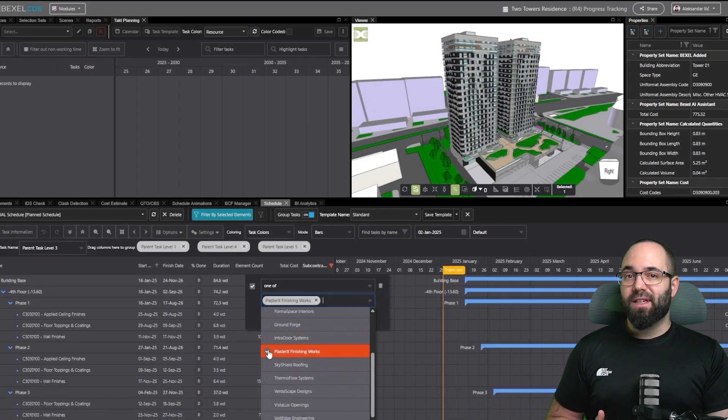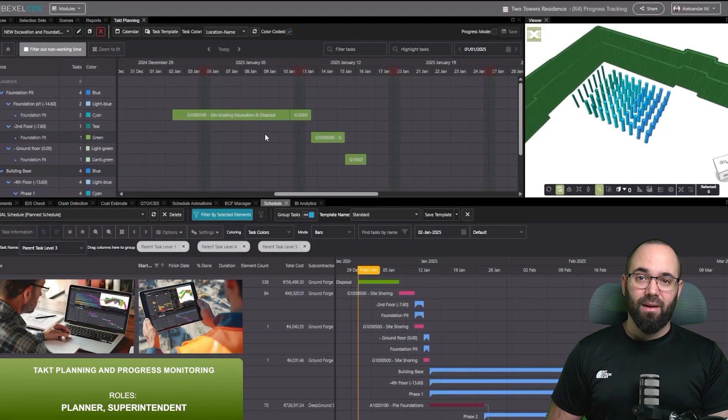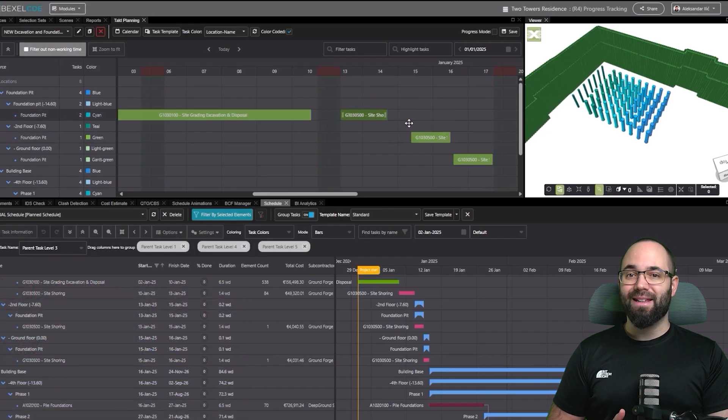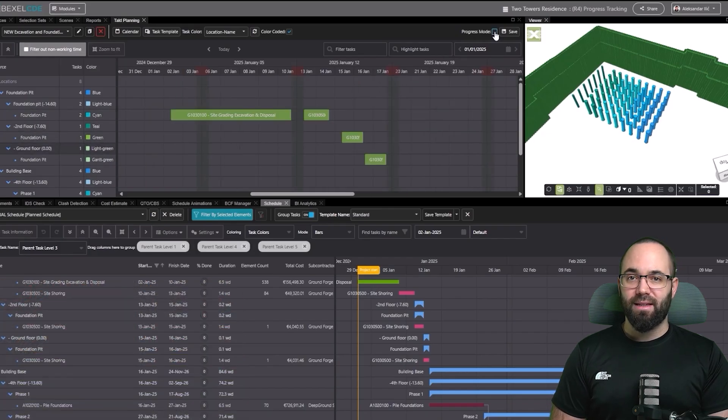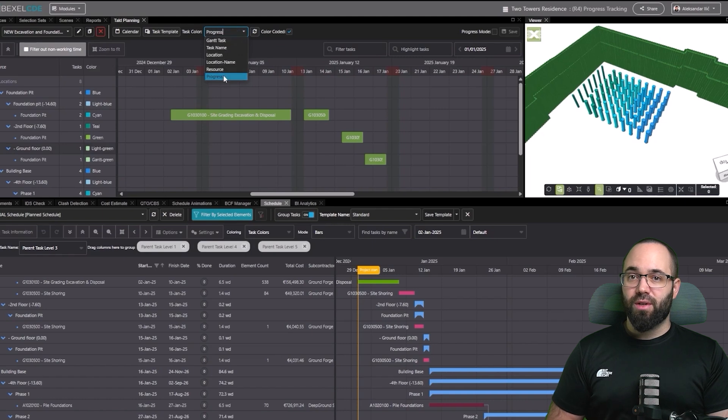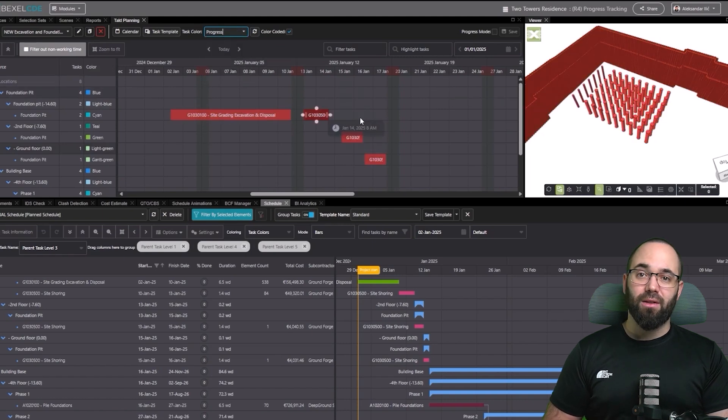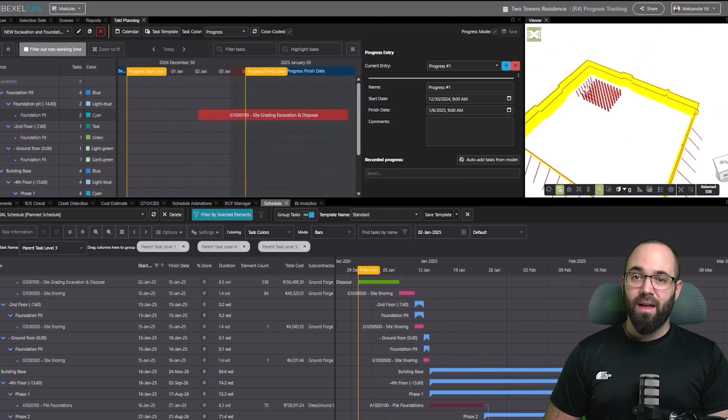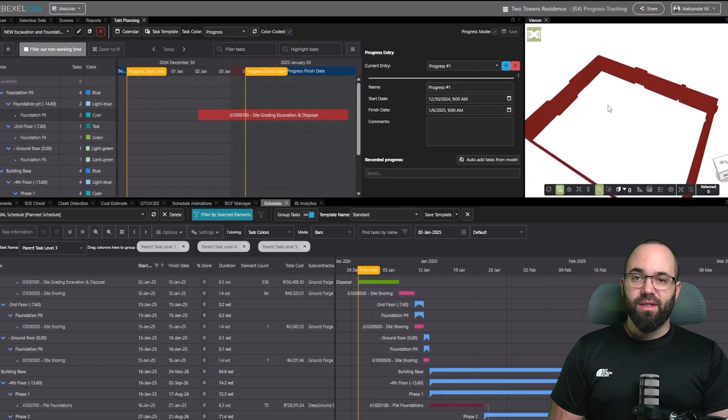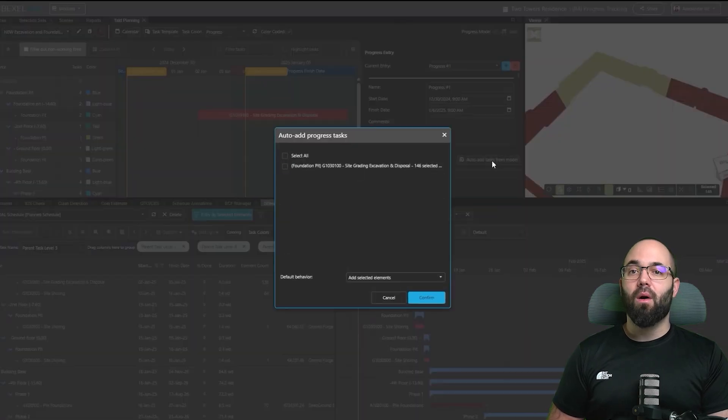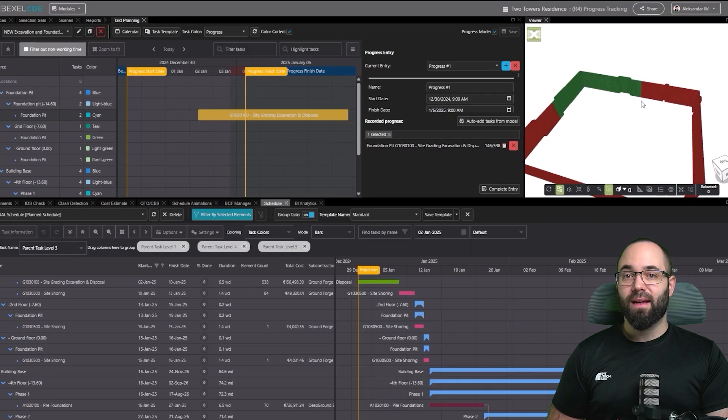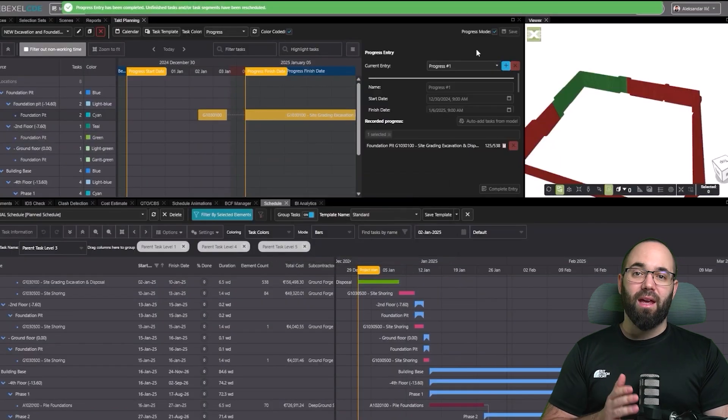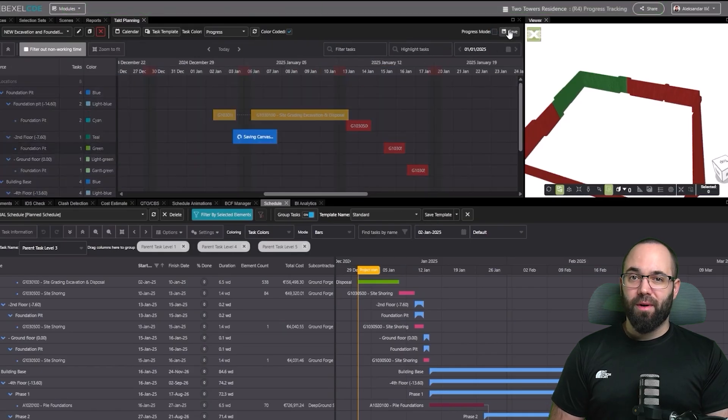After seeing the schedule module, let's explore tact planning, which helps organize tasks and track progress in detail within Bexel CDE. We can adjust task duration directly in the canvas, then turn on task colors to show progress. Everything's red since no data has been entered yet. Next, we activate the progress mode and create the first entry. We start by selecting all elements from one task, then redefine the section directly in the viewer to include only the elements that are actually completed - a new option for precise progress tracking.